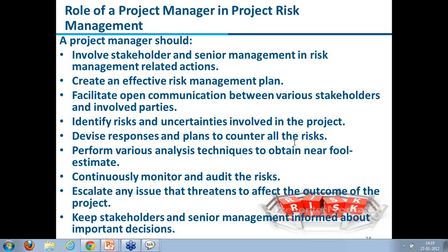Let's assume that you had estimated using a resource who had 2 to 3 years of experience. Now you don't have a resource of that category. Now you have a resource who has 7 to 8 years of experience, and he falls under a different pay scale. So obviously that is again your variance. That is what I am trying to say. Have I answered your question, Gopal?